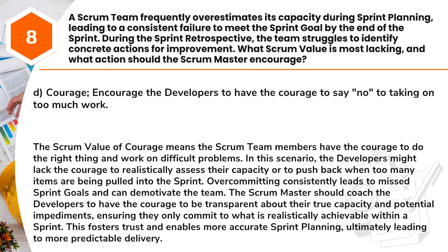Answer: D. Courage. Encourage the developers to have the courage to say no to taking on too much work. The Scrum value of courage means the Scrum team members have the courage to do the right thing and work on difficult problems. In this scenario, the developers might lack the courage to realistically assess their capacity or to push back when too many items are being pulled into the sprint.